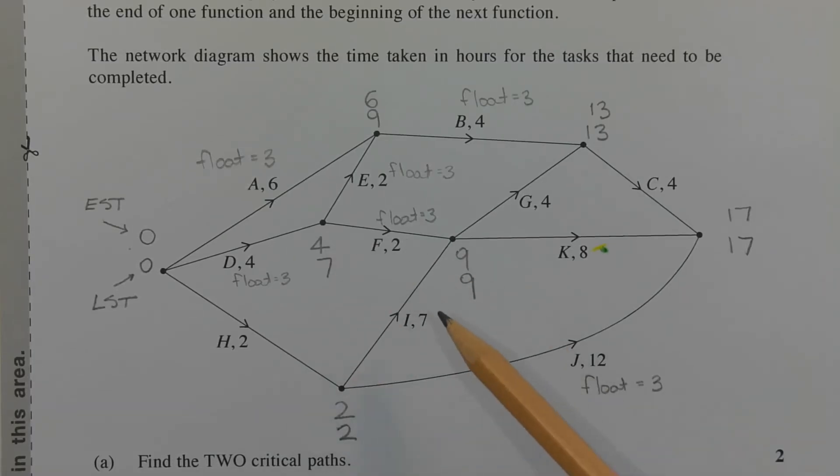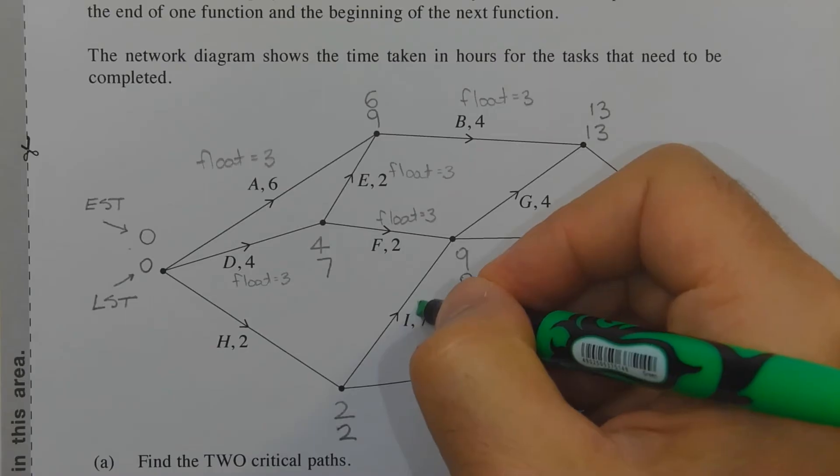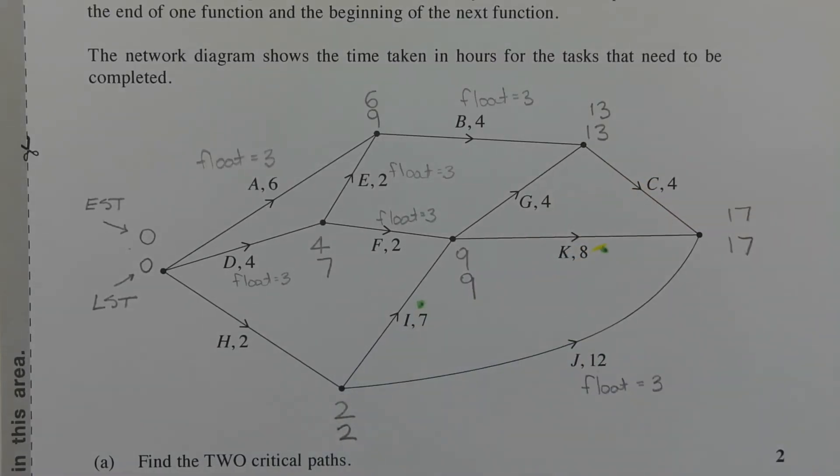Okay. Let's have a look at task I. So nine minus seven minus two also gives us a float time of zero. So this task is also on a critical path. Let's try one more. Let's look at task B. Thirteen minus four minus six gives us a float time of three. So task B is not on a critical path. And I've marked the rest accordingly. So just continuing on the same way, we end up with these float times that I've marked next to each of these tasks.